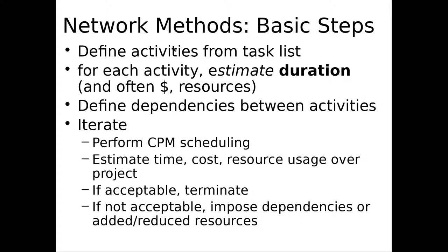The basic idea here is, look, we're going to define a bunch of activities. Tasks, I'll use these interchangeably. For each activity, we're going to estimate the duration of that activity. We're going to say how long we think that takes. And then we're going to define dependencies, meaning we're going to put a link from, say, A to B if B cannot start before A finishes. Maybe you can't start coding until you've specified what the functions are that are going to be there. Or in test-driven development, you can't start developing the function until you've got some tests in place. Maybe you can't deploy until it's been tested.